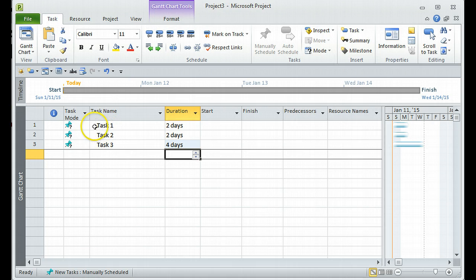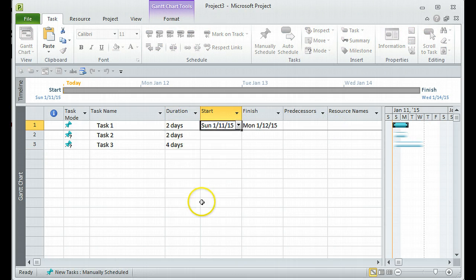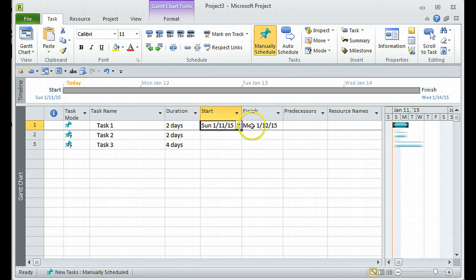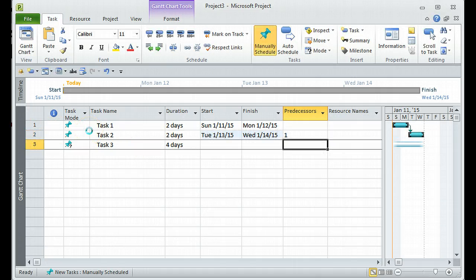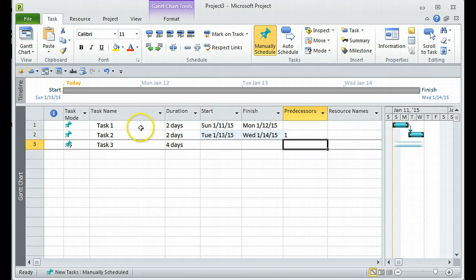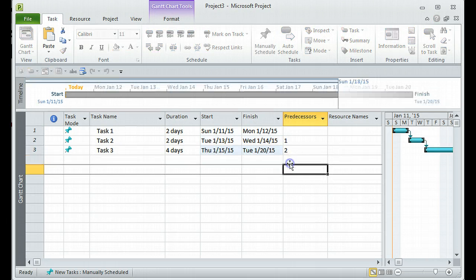You will notice that all three tasks have the scheduling mode set to manual. If the start date is today, Task One will finish two days later. If you have the second task dependent on the first, you can add a predecessor — I'm going to add Task One as the predecessor for Task Two. Even in manual mode, it takes the next day after the predecessor finishes as the start date. Similarly, if I set Task Three's predecessor as Task Two, the date updates automatically.